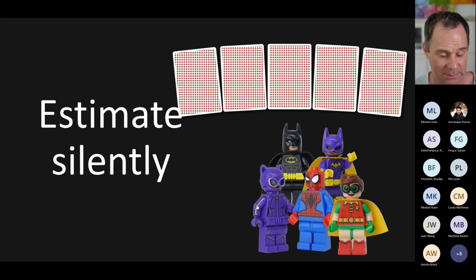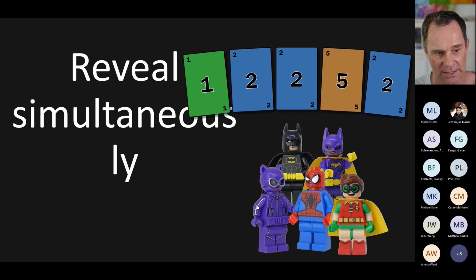So once everybody has estimated, they're keeping their cards close to their chest, literally. And once everybody's ready, they reveal their estimates simultaneously. What this does is prevent bias. If I have Jiva who goes first and declares that it's a 5, I thought it was a 2, and now I feel embarrassed. And so if Jiva revealed his first, his 5 might influence my estimate, and I'll just go copy Jiva and estimate 5 as well. So by estimating silently, simultaneously revealing those estimates eliminates that bias.